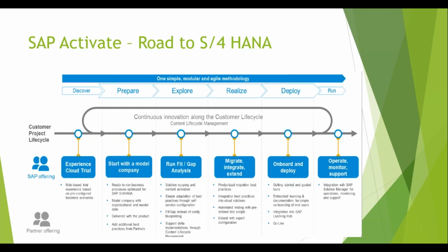So what I'm saying is you identify the gaps, but these gaps need to be resolved. I'm not saying that these gaps will always remain as they are. Whatever gaps you identified, you need to discuss those gaps. You need to propose the solution, whether it can be filled with the standard business process, or it will be done via some Z development, or maybe the customer has agreed to change the business process.